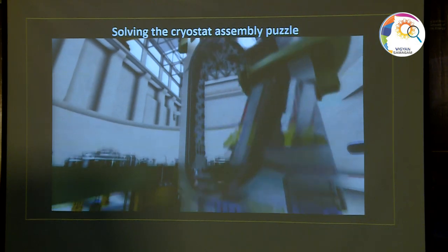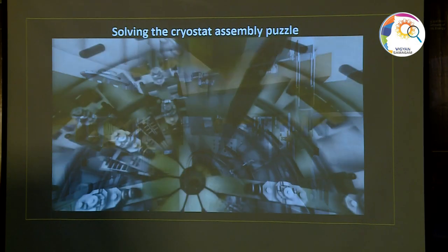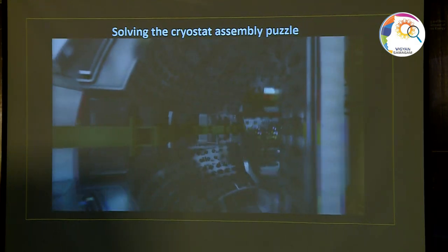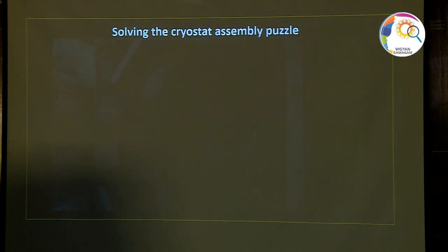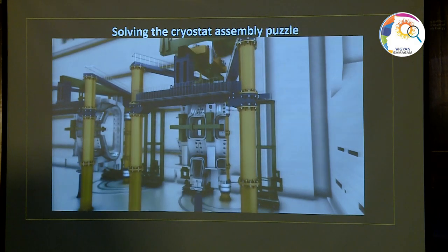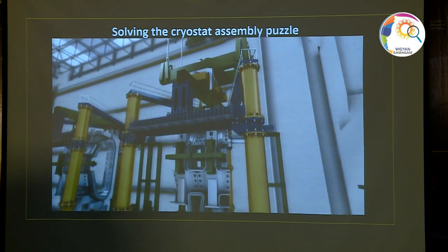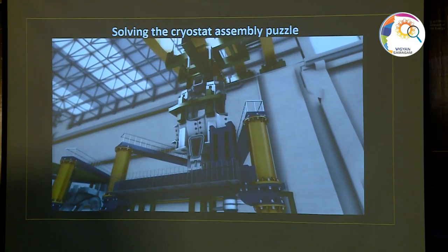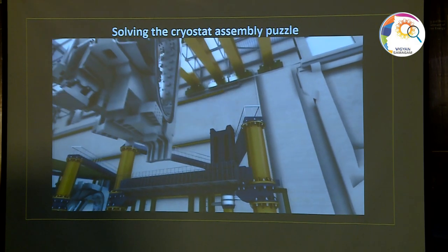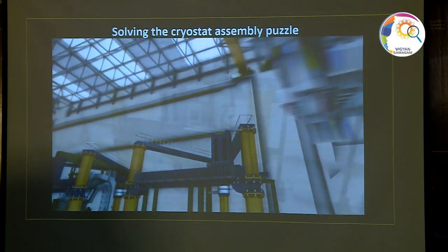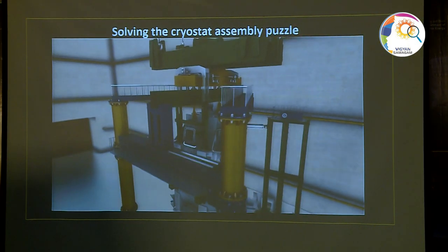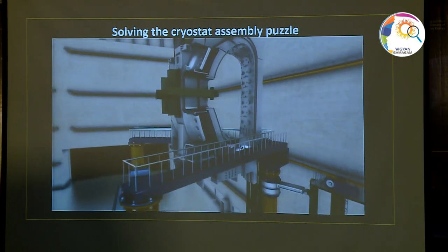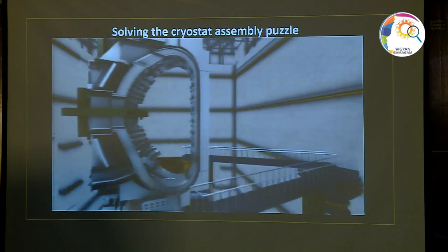This procedure will be repeated consecutively to achieve 9 sub-assemblies, which will be transferred into the tokamak pit for the final sector assembly. The lifting system will be comprised of a pair of independent bridge cranes mounted on rails that run the entire length of the tokamak and assembly halls to form a continuous 175-meter-long crane bay. Working together, the 4 375-ton main hoists will handle loads of up to 1,500 tons.